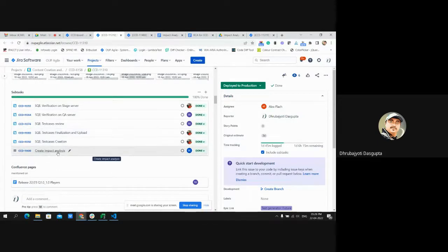And this impact analysis document should be attached in the subtask of the ticket on the first day of the sprint, that is the planning day. That means we need to analyze the ticket beforehand so that we just record all the changes or all the necessary steps in the impact analysis document on the first day,